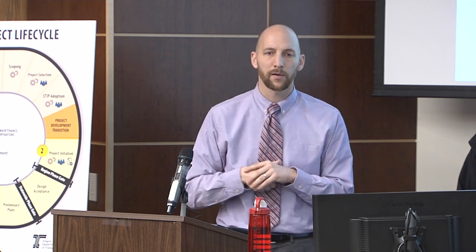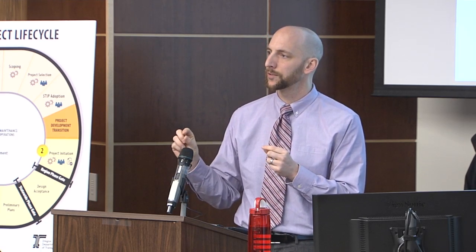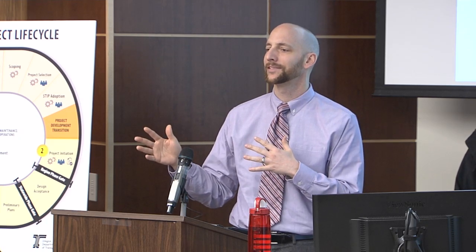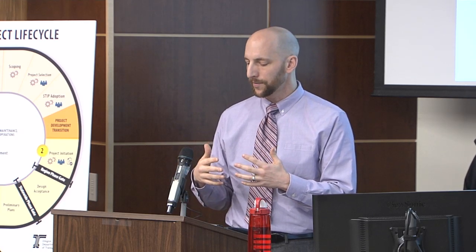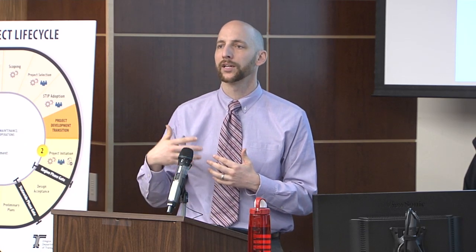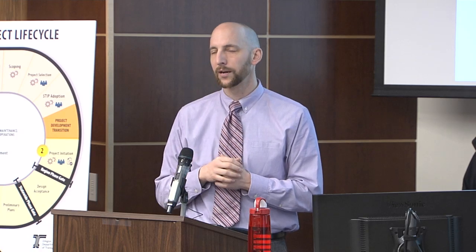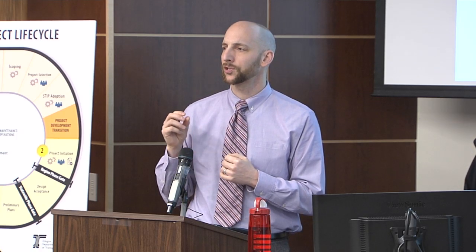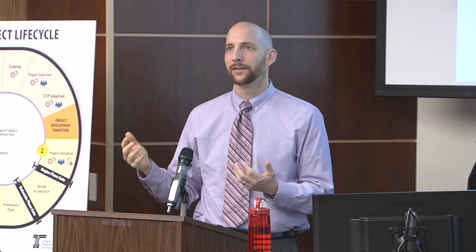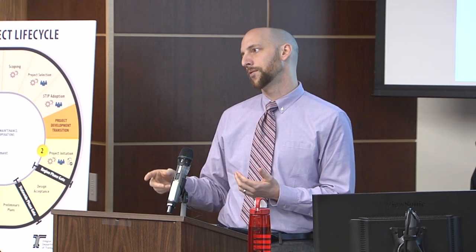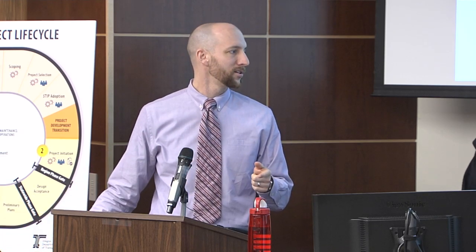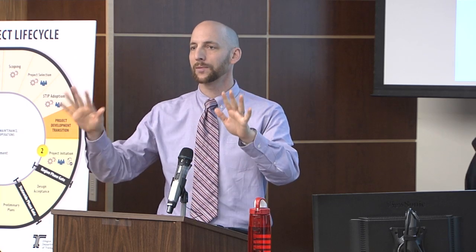And so earlier when Jeff Flowers was up here talking about how to write that project description, what was his thing? Vague but flexible, or succinct but flexible? We're kind of in that same space. You want the business case to be specific enough so that if you're a scoping team leader or a contributor as a technical expert, you know what you're working on. But maybe you don't prescribe that you're going to do a full signal replacement. The business case doesn't say, oh, and by the way, you're going to plant the 14-inch mast arm pole here, and you're going to hang it here. No. That's for the project delivery team.